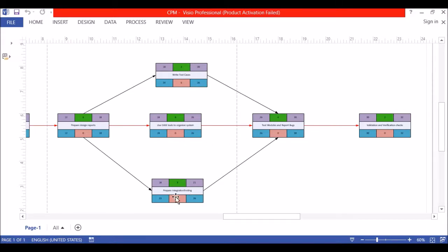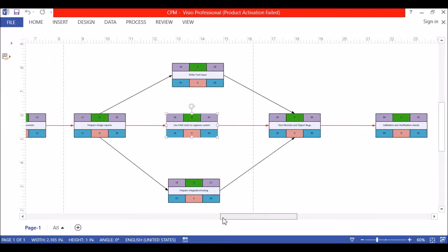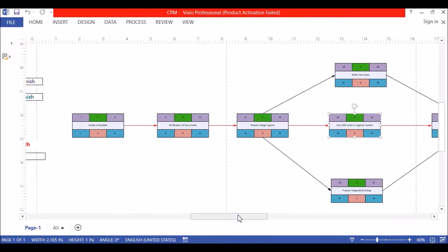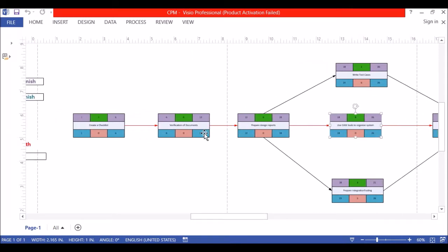The difference with this is, instead of carrying across the largest number, you're going to carry across the smallest number. After subtracting each one of these, the smallest latest time is 18, and so you carry across the 18, and from here you continue subtracting the duration time. So 6 from 18 is 12, carry across the 12, and 6 from 12 is 6, and 5 from 6 is 1, and that is basically how you get the latest start and finish times.